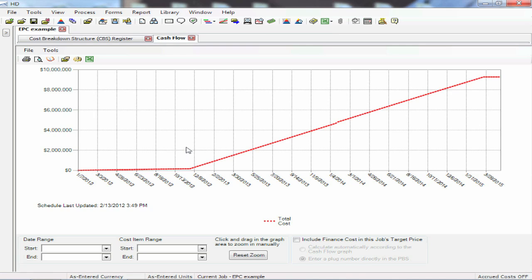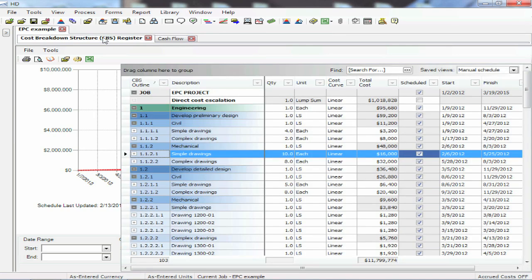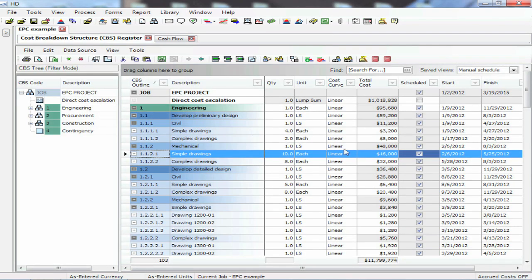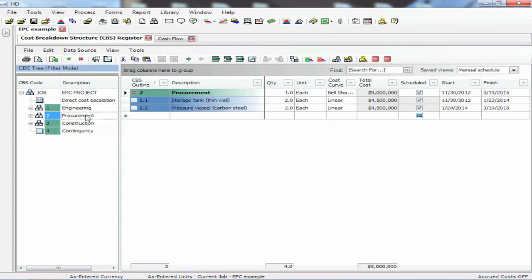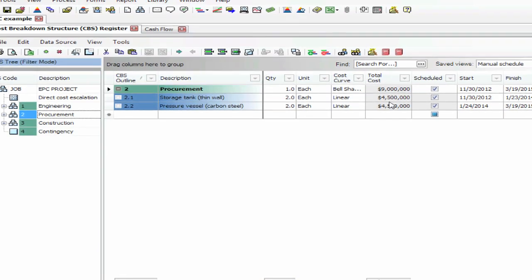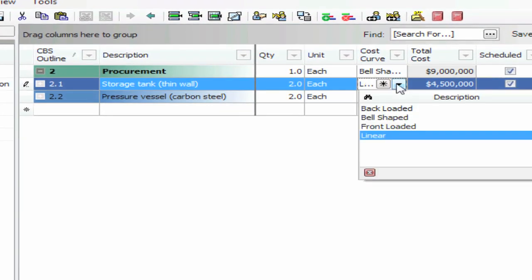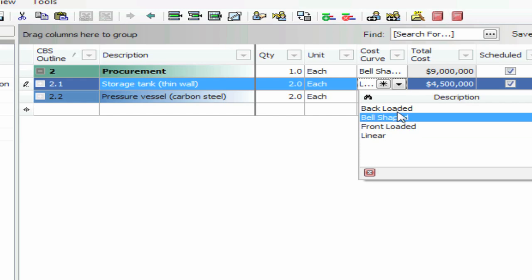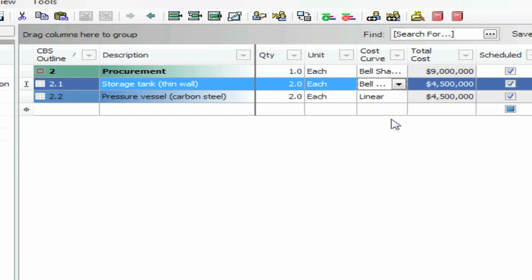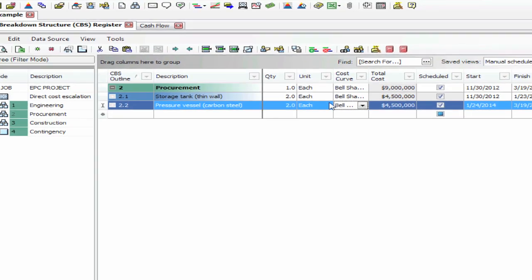Now this is a nice ramp up, but that's not really how it's going to happen in the real world. If we come back and look at one of the other new features in version 11 — custom cost curves — this gives us the ability to apply a unique curve to each item in the cost model. So if we go down into the procurement section, we have a couple of pretty high dollar items here: storage tanks and pressure vessels. Instead of doing a linear curve, which is the default, let's apply a different type of curve. We can use any of these predefined curves, or go in and create our own with as many points as we want. Let's just do a bell shape.